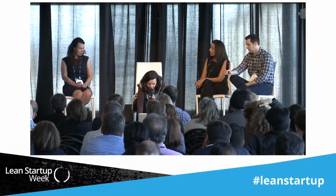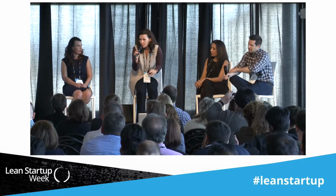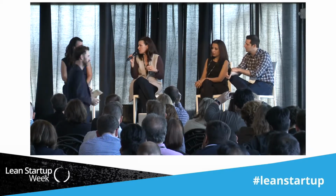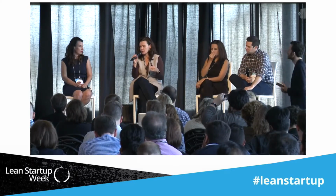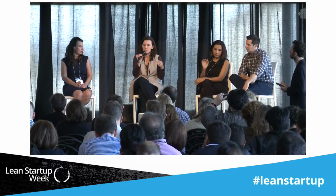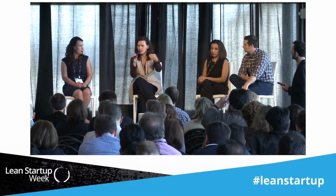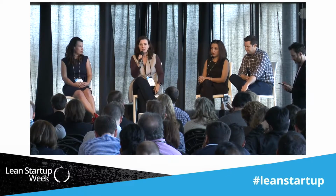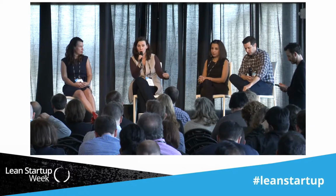Okay, here we go. So if you look at the CRM approach from a user's point of view, from a customer's point of view, this is how we broke down the tasks, and this is how we actually broke down the design. If you actually thought about these 7 weeks, each week was a design sprint. So if you guys heard the speaker from Google yesterday talk about a design sprint, each week was a full-on design sprint for 7 weeks in a row.